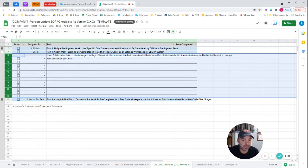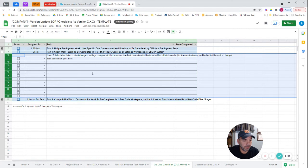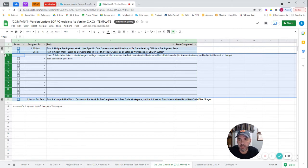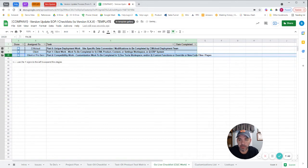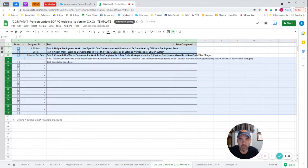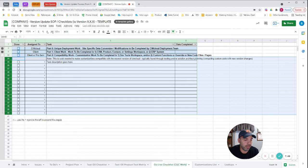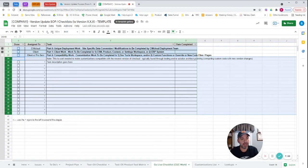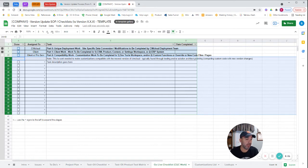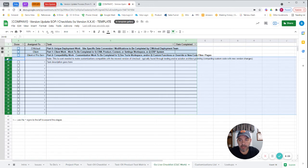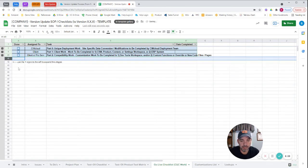On small version updates, there's typically little to none of this. On larger updates, there may be stuff related to new features that you have to make decisions on or setting changes that you need to make to be compatible with the new version update. That's all called client work. Compatibility work is stuff that's related to your customizations. The SimCloud product team is not testing our core product with your customizations. That's a solution-related responsibility that has to happen after the version update. We're providing a sandbox environment to do that in to try to insulate that and give you basically a preview to go test and validate. The key here is there has to be thorough testing done after the version update, which is where your testing checklists come into play.